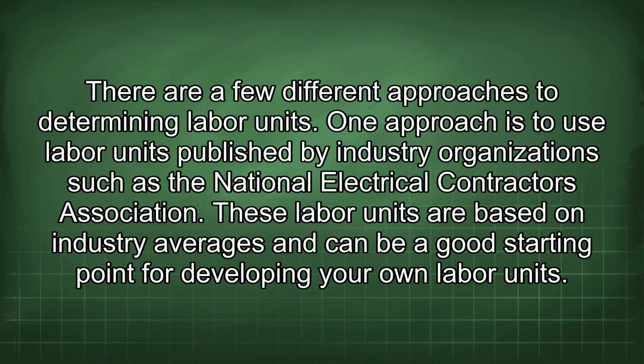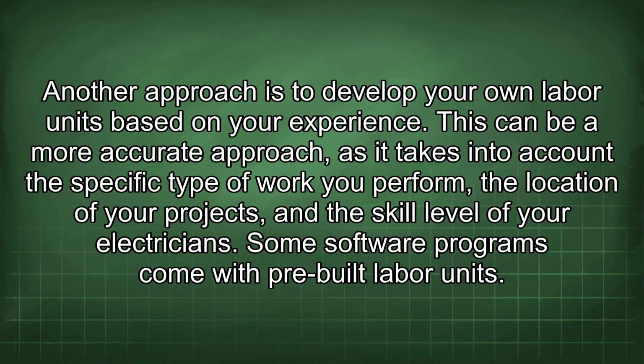There are a few different approaches to determining labor units. One approach is to use labor units published by industry organizations such as the National Electrical Contractors Association. These labor units are based on industry averages and can be a good starting point for developing your own labor units. Another approach is to develop your own labor units based on your experience. This can be a more accurate approach, as it takes into account the specific type of work you perform, the location of your projects, and the skill level of your electricians.